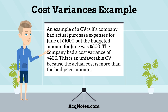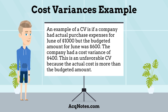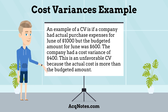An example of a CV: if a company had actual purchase expenses for June of $1,000 but the budgeted amount for June was $600, the company had a cost variance of $400. This is an unfavorable CV because the actual cost is more than the budgeted amount.